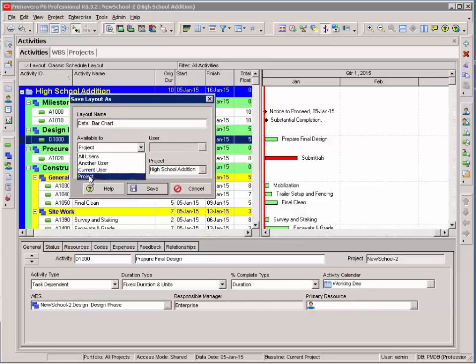How that works, if I save it as a current user, that's for me, that means any project that I open, this layout will be available in that project.